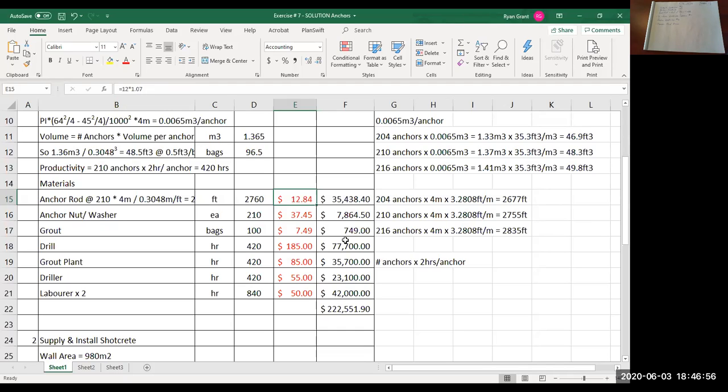Unless the quote specifically says it includes PST, assume that it does not include PST. Or you can call the supplier and ask them if it's unclear. Of course, if you're purchasing hundreds of thousands of dollars of materials, that PST dollar amount adds up quickly. So you need to ensure that you're including PST.